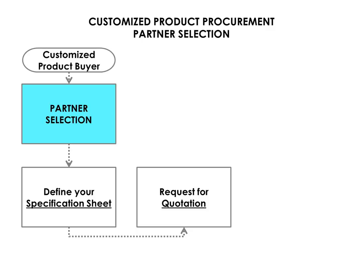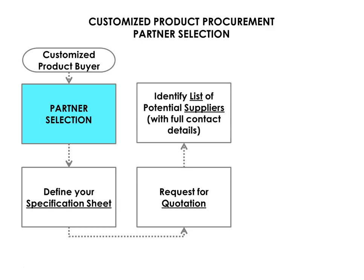This pack should include all your technical drawings, specification details of different parts, estimated quantities per year, and any information that will help potential supply partners to provide the fullest quotations they can. Once you get your quotations back from the suppliers you approached, it is time to create a shortlist of potential suppliers that you feel are the best match to your requirements.